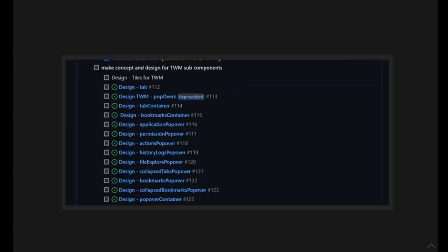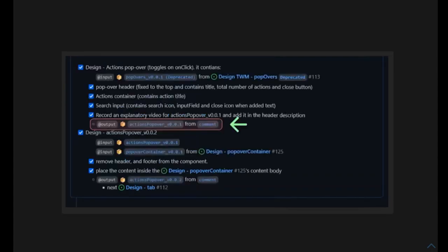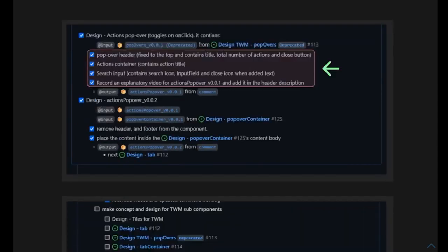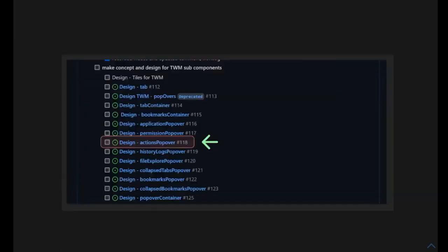Every GitHub issue is also a task somewhere in the project. There is one root issue per project, so all these tasks you see here in this issue are directly or indirectly linked to the project's main root issue. A task on issue 1 can be a normal task with an output. A task in issue 1 can also be a subtask in a task group with or without an output.